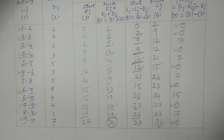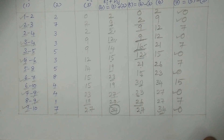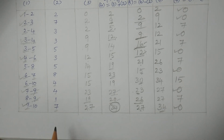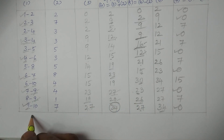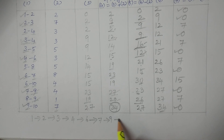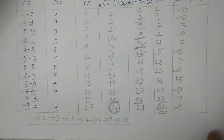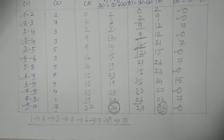If you observe the zeros in the total float column, the corresponding activities are critical activities. From the observed critical activities in this table, we get the critical path: 1→2→3→4→6→7→9→10. The total minimum project duration is 34 days.